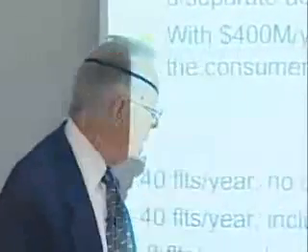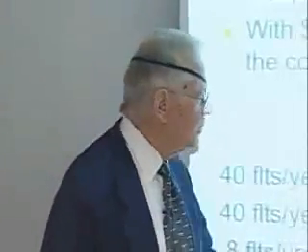8 flights per year, including overhead, runs it up to $60 million in 1970 dollars. And 8 flights per year is just sort of what we've been running here recently. 135 at time of first flight and $302 million a flight in 2005. Now the cost per flight on the shuttle, I don't know. I know that it's up in that $400 or $500 million price. I use this only to give you a kind of a rough feeling that although we missed operational costs badly, we didn't really just be totally out of the ballpark on them.